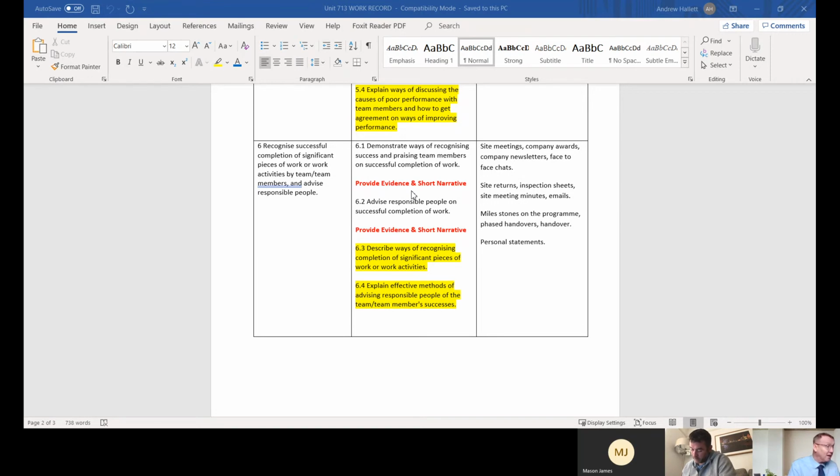If that's the sign off. Do you then have to feed back to? Who does the M14 go to? That's probably where my question's going. That goes to the SPM and the project manager, the DPE, and then the contractor. And once it's all signed up by the contractor, then it's formally issued to the road asset manager.